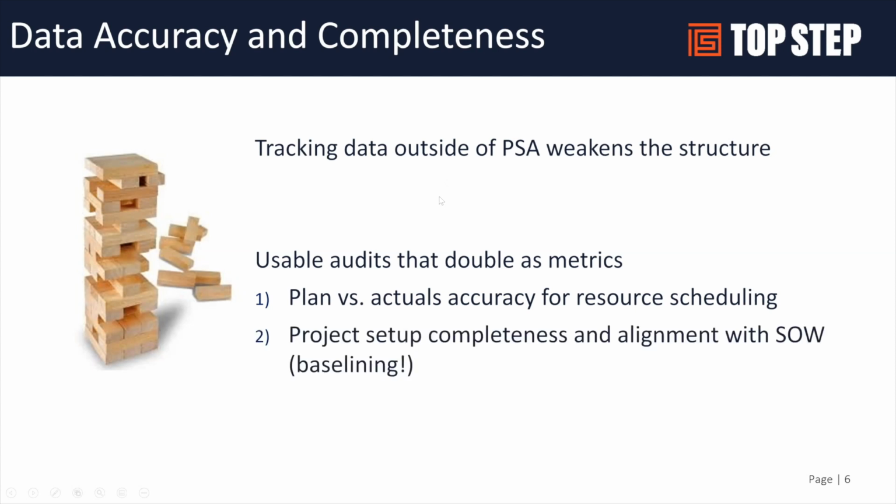Project setup and completeness. How many of us have set up a project and didn't realize that within the SOW there were extra hours for this or that? So it's important to make sure, if we're using OpenAir and you're managing your project budgets, budgeted hours at the project level, at the task level, budget dollars, that your project setup is complete and aligned with the statement of work, what was sold.